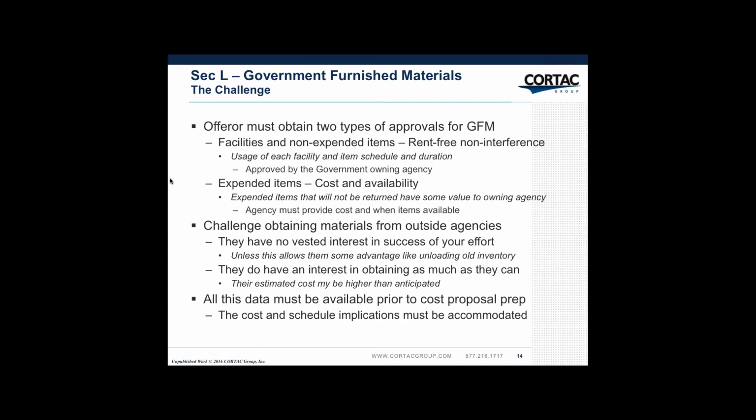And all of this data must be available prior to your cost proposal preparation, right? Because if we have a price to win number that we've got to hit, we've got to fold the cost of the GFE into that price to win. Therefore, we need to know how much that is, as well as the schedule implications on my program plan, which will also impact my schedule.